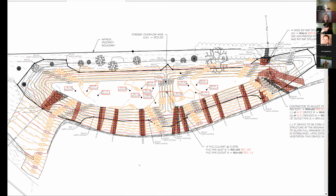So you're looking at allowing this exception from standards for a small fee in lieu payment of roughly $1,300. I'll finesse or figure that out with more precision in the coming weeks. And I'm asking for your approval to allow that fee in lieu payment.